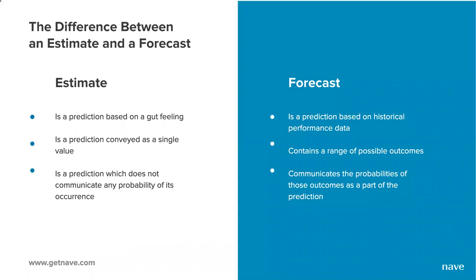It is important to note that data displayed on a CFD depicts only what has happened for a given process and should not be used for any type of future predictions. When it comes to future predictions, there are two approaches to answering the question 'when will this be done?': an estimate and a forecast. Estimates are predictions based on guesswork, judgment, or intuition — delivered as a single value, with no probability of occurrence. Forecasts, on the other hand, are based on historical performance data, communicated as a range of values with the probability of those values occurring. Forecasting is faster, cheaper, and much more reliable than estimating.